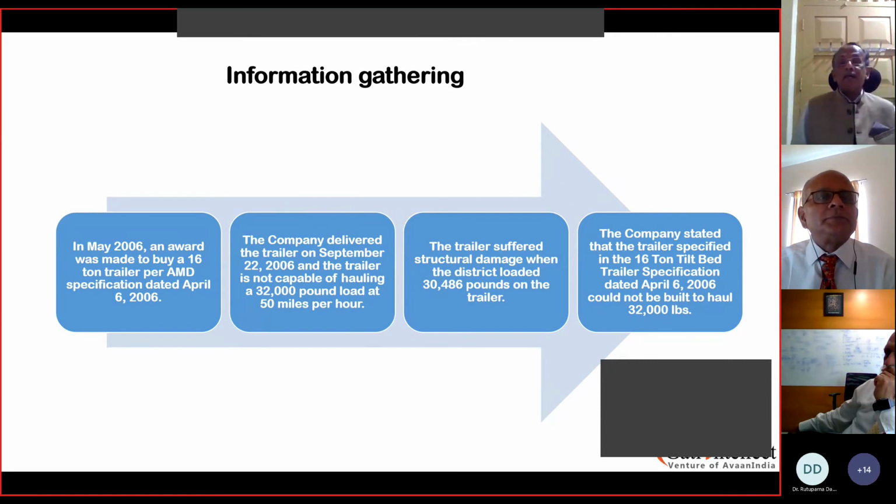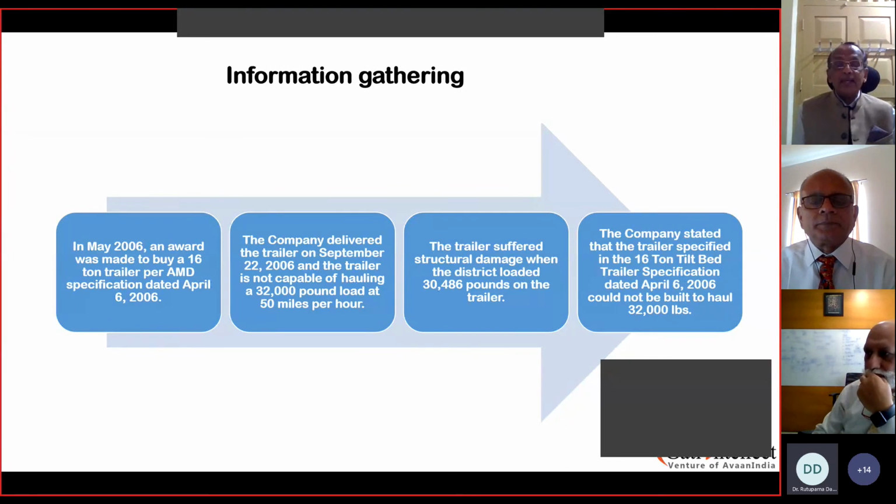There's an incident which comes to my mind. Like I said earlier, I've been working heavily on large projects. In my career, I had faced one very difficult situation. We were handling an ODC, over-dimensional cargo. We were offloading it directly from the ship onto the trailer. We were given the specification and the trailer, a hydraulic trailer, like what Captain Yogesh has already explained. Everything was prepared, and as the heavy lift cargo was being downloaded from the ship, we could understand that the trailer we had provided was not sufficient. It was a hell of an embarrassing moment. So we requested the ship to hold on.